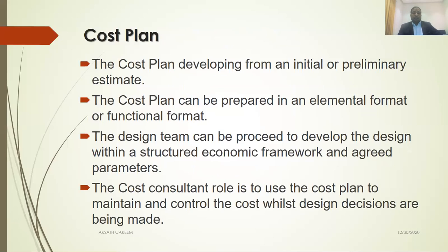Further, the cost plan is developed from the initial preliminary estimate. So before the cost plan, you have to do a preliminary estimate. In the later slides you will learn what preliminary estimate methods are available. To develop a cost plan, you need a preliminary estimate.